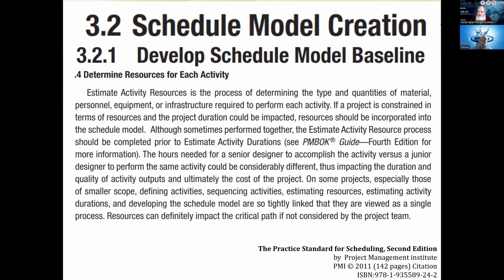For every activity, I must know how many people, how much equipment, what all should be available to do this activity. And make sure all of those materials, personnel, equipment, infrastructure, etc. are available just in time to start that activity.